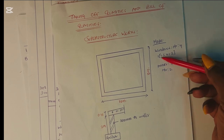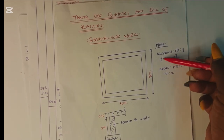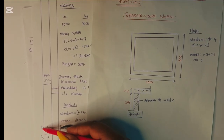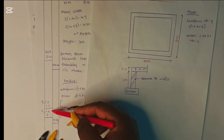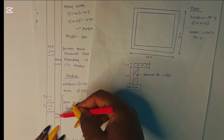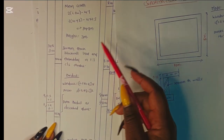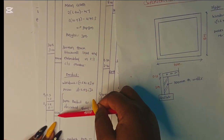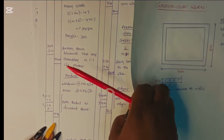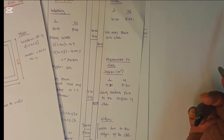The windows are 4 in number and the doors are 2, so we deduct these openings. That is 1.5 by 1.2 multiplied by 4 for the windows, and 1.2 by 2.1 multiplied by 2 for the doors, which gives us 12.24. When preparing the BoQ we subtract this to get the net quantity of the walls.